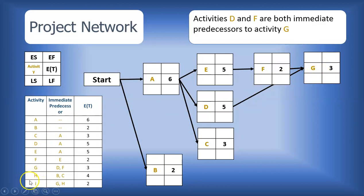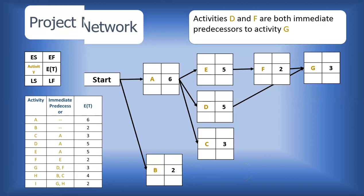Next, we have activity H, and it has two predecessors, activities B and C. So that means we will have one arrow coming from activity C and another coming from activity B, and both arrows will be going to activity H.